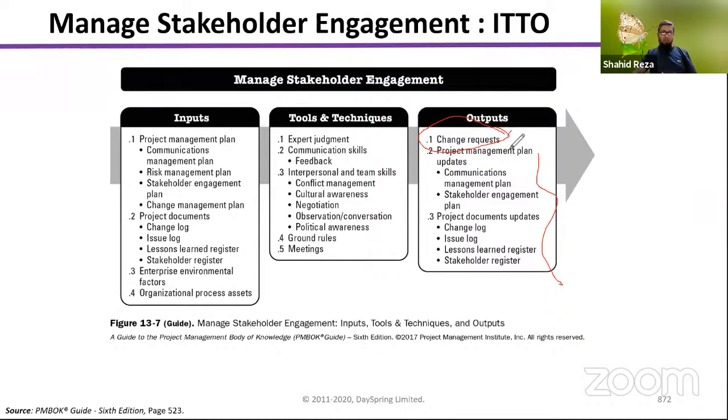All right. So in a change request, you will find out whether the planning is effective, whether the stakeholders are engaged and involved with us. Is there any gap? That analysis you have to do. And if any change is required, then this change request will update what? Mainly plan stakeholder engagement. Number one. Number two is also identify stakeholders.